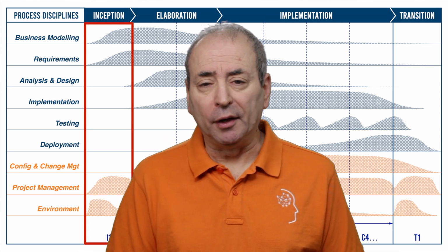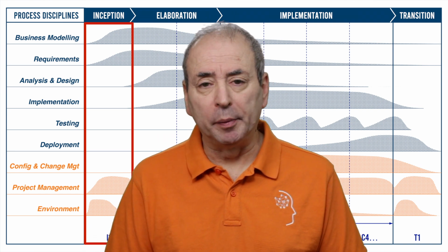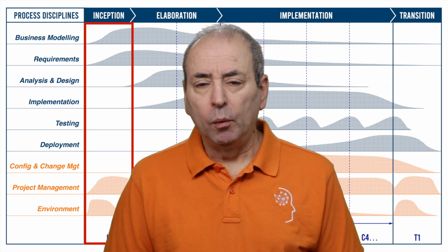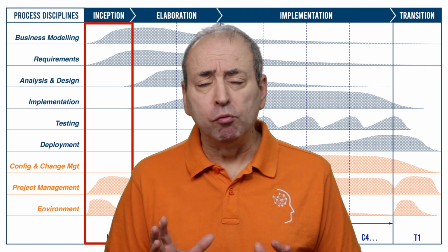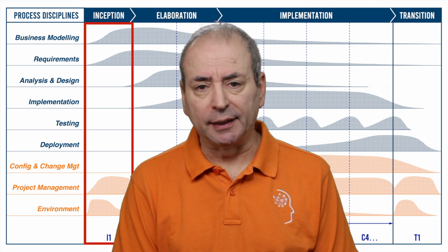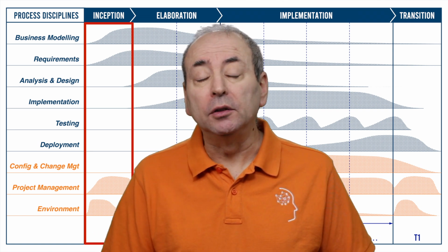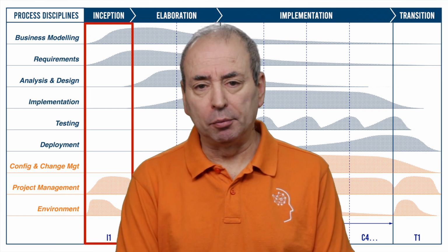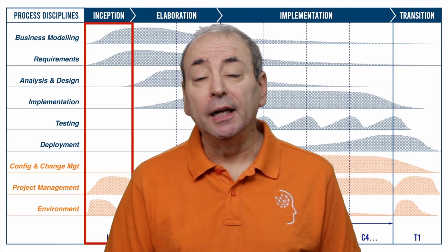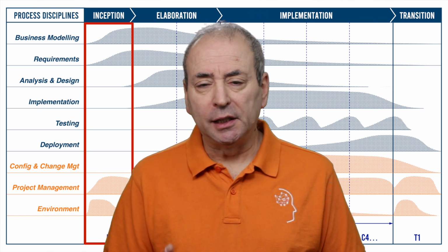And finally, we might also develop a simple prototype of the user interface that we'll be creating. We also need to carry out an initial risk analysis to get a sense of what the big risks are that can affect our project. And all of this will feed into a business case that we can use to secure the funding we need for the project. And finally, in the inception phase, we also develop a high-level plan which shows how we're going